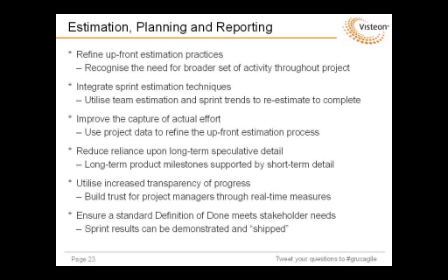This could change some of those early models and also allow us to better allocate people over time as opposed to in big chunks, and balance the use of people's skills across many projects. We also talked about lots of techniques around sprint estimation and relative estimation and the benefits of that to teams, but also recognizing this will give us some new data that we need to potentially use and give us more honest measures of what's really happening as opposed to the classic speculation driven by effort spent.